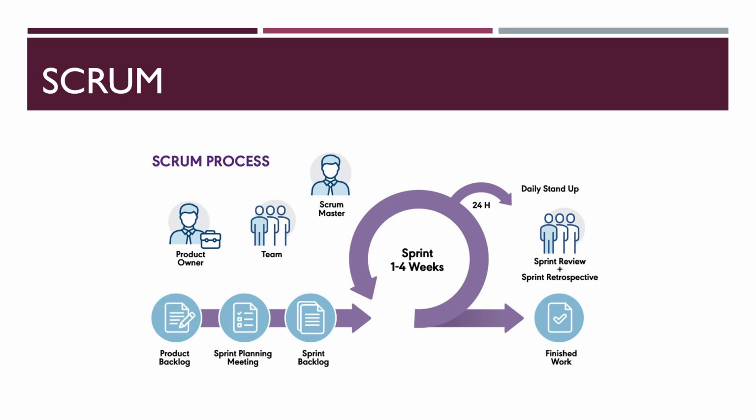Coming to the first phase, product backlog creation: the product owner works with the Scrum team to prioritize items based on customer priority, feedback urgency, difficulty of implementation, and relationship between the items. Based on these criteria, the product owner will index the user stories, and various items are included in the backlog, like features, bugs and defects. Information acquisition and technical work are also included in the product backlog. Large items are transformed into user stories and epics.